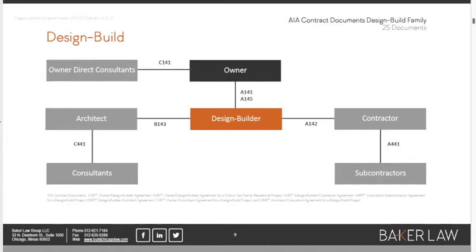So on a design build project, the A201 general conditions does not apply. If we stop the presentation right now and you learn nothing else, that is the most important thing you have to understand: when can you ignore the general conditions and when does it apply?